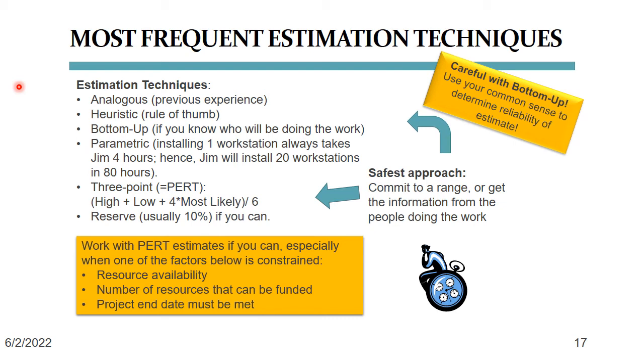That is called analogous estimating. On the other hand, if we apply values we know to be true from our own experience, that is called heuristic estimating. This method is very close to parametric estimating, in which we use experience factors for a specific worker or role. The line of thought goes like this. It always takes Rajiv 3 days to write and execute tests on hardware with one operating system. This project requires both Linux and Windows hardware. That's 2 operating systems, which means 3 days times 2. So chances are that Rajiv may take 6 days for this task.